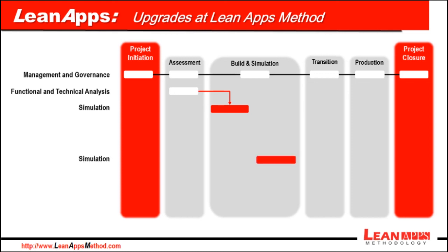Simulation is represented twice in this timeline, meaning 2 upgrade simulations. But as I said, the project could require a third simulation depending on some variables. Patches applied to fix bugs during first simulation must be applied during technical upgrade step at the second simulation.